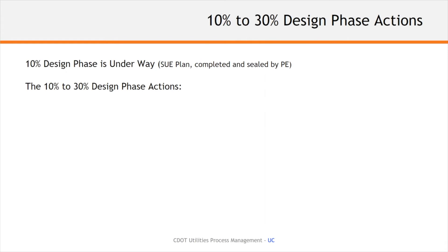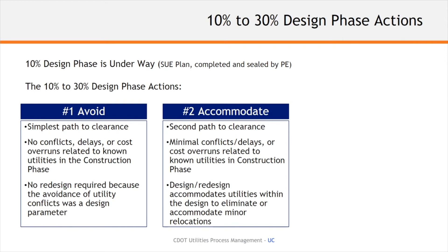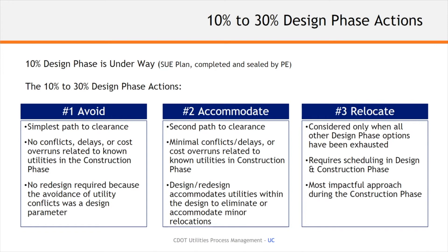From 10% to 30% design, we're looking at the SUE information being delivered and then allowing designers to leverage it to, one, look at avoiding utility relocations altogether if possible; or two, how the utility conflict matrix could show that we could accommodate those utilities — maybe an adjustment in place or a modification to the design to allow that utility to stay in place. That might keep the project out of a long, lengthy utility negotiation and relocation effort. But if it cannot be avoided or accommodated, then relocation will have to commence, and the utility conflict matrix will capture that relocation effort, who's responsible for it, when it's going to happen, and allow better negotiations with the utility companies.